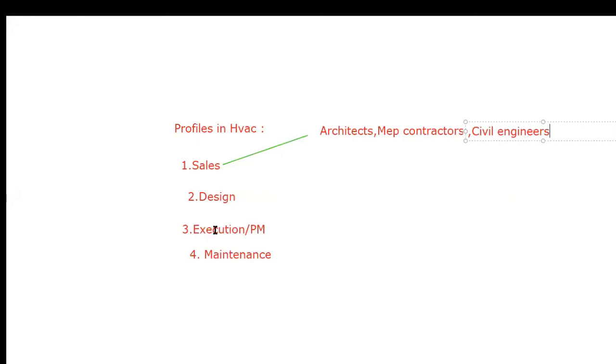So these people will visit the site and arrange the laborers. They'll attend some safety induction classes before commencing the execution. Some safety induction classes will be there at the site, and they have to apply for that. If our project is happening in the ministries, or in port related projects, or airport expansion, then in order to enter the site, everybody should have a gate pass. So 1 month prior to the execution work, or at least 15 days prior, they have to apply for the gate pass, and even for their company vehicle they need to apply for passes. Then only they can access the site.